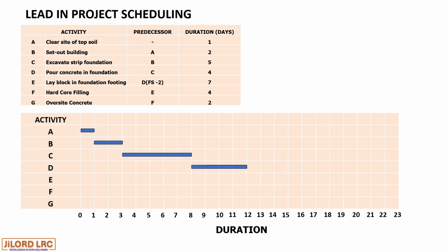and activity E has a lead of 2. So whilst activity D started and yet to complete, activity E commences. Means there is a relationship between these two activities. That is why D precedes E, but D wouldn't be completed before E starts.